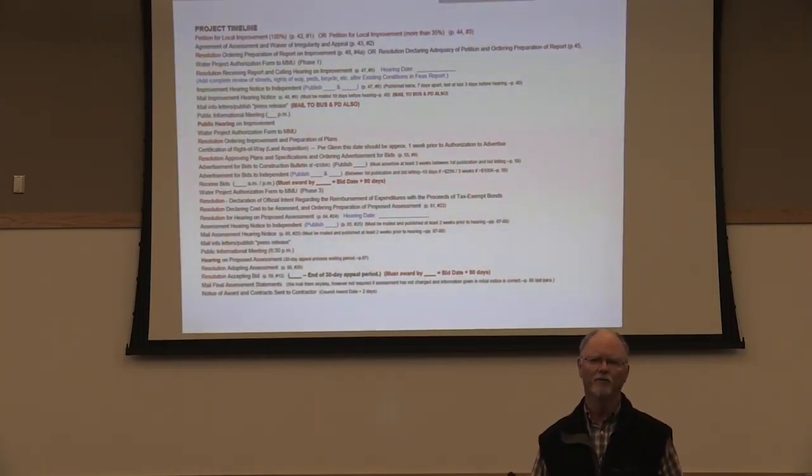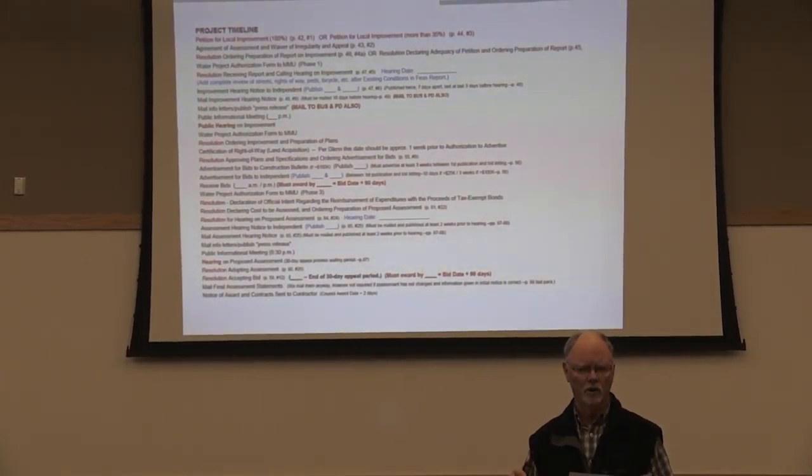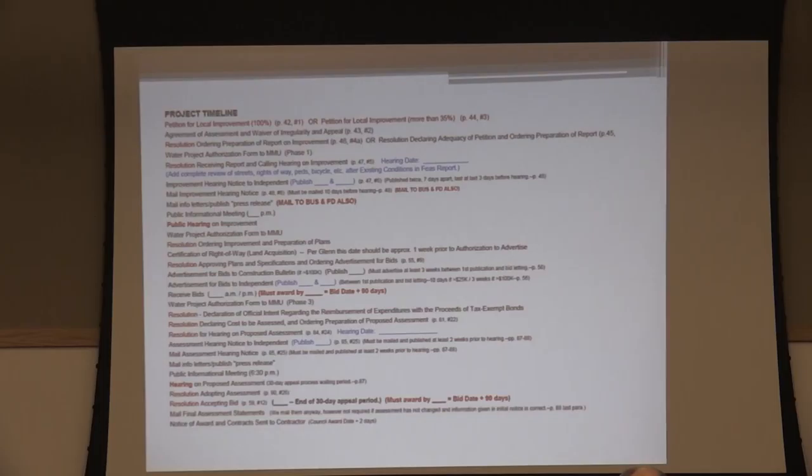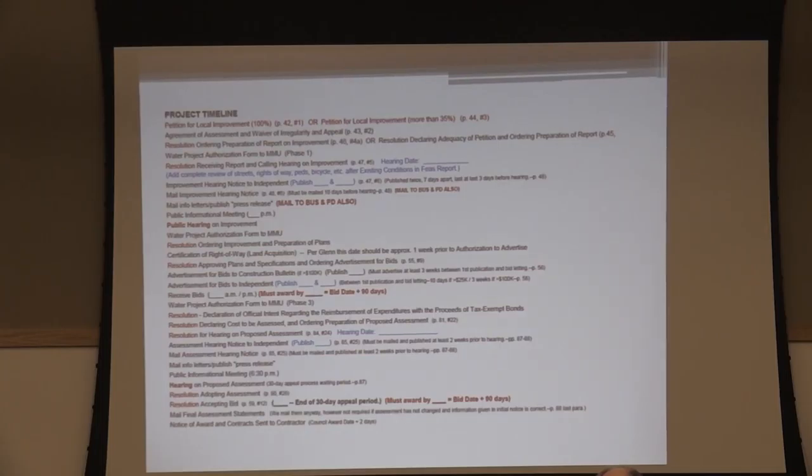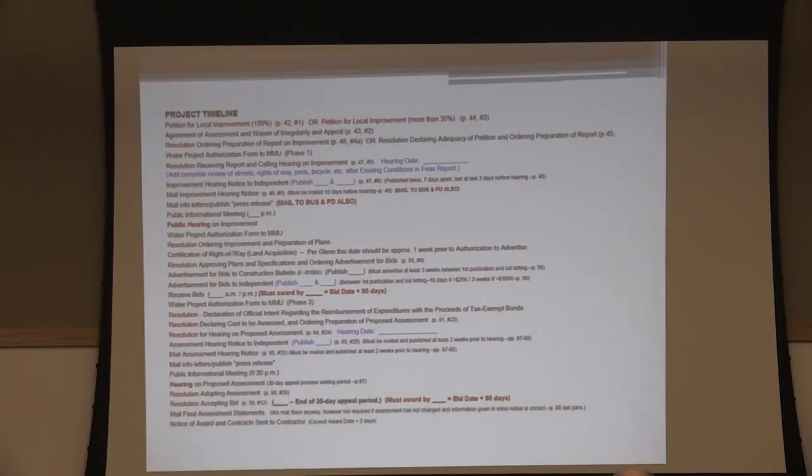We then send the authorization form back to Marshall Municipal Utilities for final project development and associated potential costs. The City Council has a resolution ordering the improvement and preparation of the plans. If we don't have all the right-of-way necessary, we'll acquire it, though it's seldom needed. At the next council meeting, there's a resolution approving the plans and specifications and ordering the advertisement for bids.